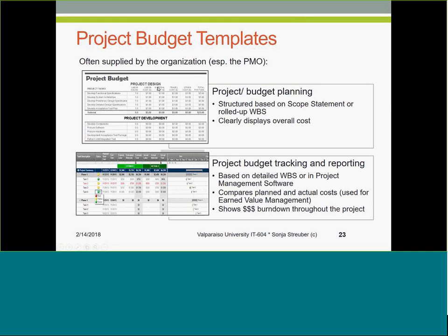Kind of the information up here, because in the planning phase, all we have is estimates, right? But as we start moving into the execution phase with our project budget, that's when we look at the estimates right here, and then start pairing them with where it says actual labor, actual materials, actual total, right? Where we have to compare our estimates with the actuals.